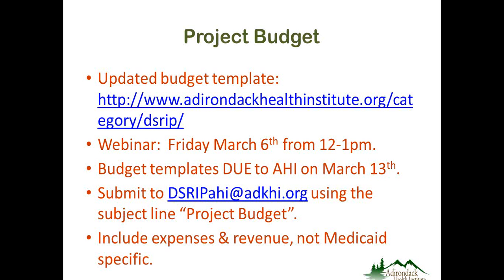One of the important questions that came up when we were in Lake Placid regarding budget was people asked, do I need to prorate staff time in my budget so that I'm really only budgeting for the proportion of time that a given staff person or provider is serving Medicaid patients? And the answer to that is no, you do not need to do that.